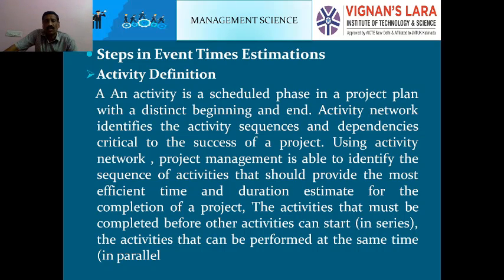Time duration is also estimated when the activity is clearly defined, consisting of a duration with reference to optimistic, most likely, and pessimistic time durations of the project site and project environment. So, the first step is activity definition. No approximation, no imagination, but correctly and accurately estimating the time with reference to the project environment.